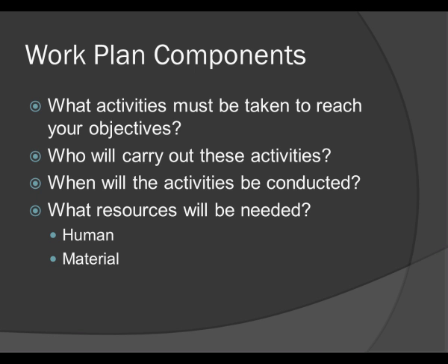If you wrote down activities, responsibilities, and time, you were right on the mark. Your work plan should show what activities must be taken to reach your objectives, who will carry out these activities, when these activities will occur, and what resources, both human and material, you will need to accomplish these activities.